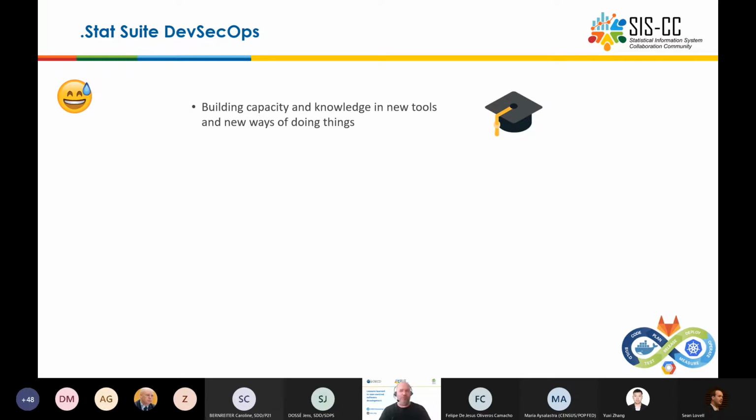So we adopted new principles through webinars and training sessions from the lean management, especially building Kanban boards. Kanban boards for us is really key, and we brainstorm a lot around that for setting up new steps of our process for the delivery with very specific rules for each of these steps and specific rules from when can you allow yourself to move from one step to the next. And these match the DevSecOps process and delivery process as well.